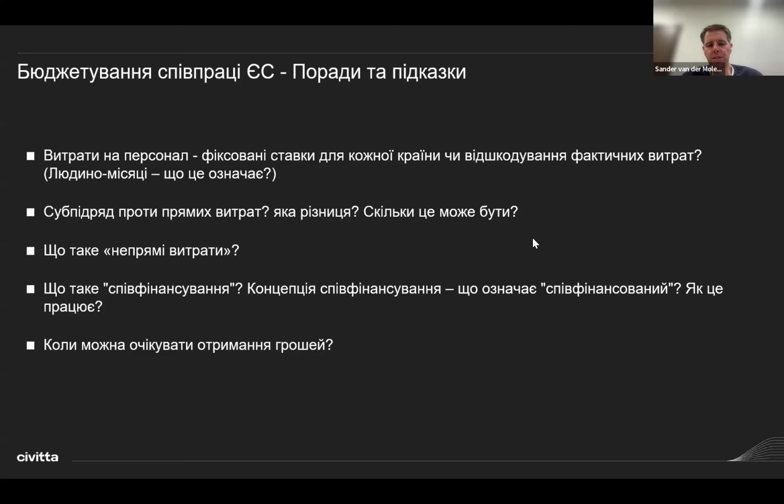And you need to have a good justification why you want to subcontract activity. You need to justify how do you find, or have you already found an organization that will subcontract, that will do the activities on your behalf and invoice. This could be through different processes, how you identify to do this. It could be in public procurement. You could ask different organizations to make a bid for it. But you need to identify already in the project proposal stage why you subcontract certain activities, how you will choose another organization and the best organization to do this, or have you already chosen?